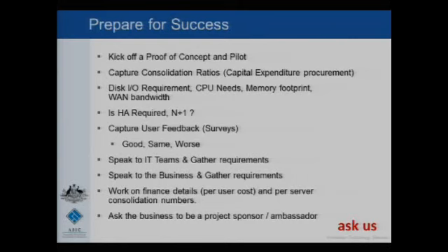For the user feedback surveys: is it good, is it the same, or is it worse? Normally surveys have five options, and when you read those surveys, you really don't get a good handle on what the response is. This one, I've got two out of three chances for a successful or positive outcome. If it's as good, that's okay. The users weren't complaining before. So two out of three options for the project to be deemed a success in the early phases was good. Speak to the IT teams, speak to the business, gather their requirements, and then make sure you deliver those requirements in the solution.